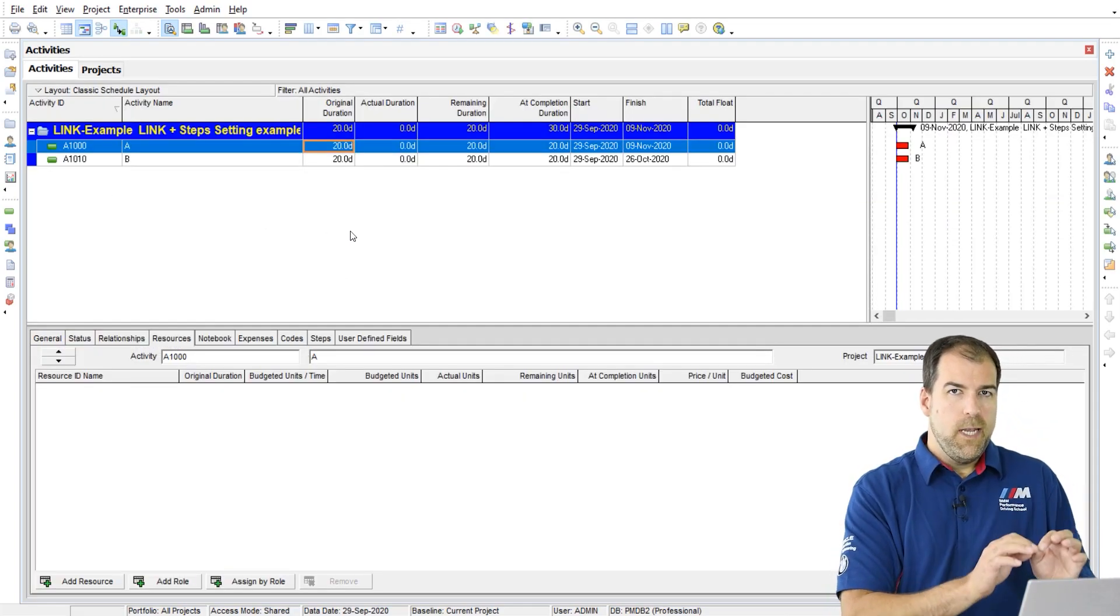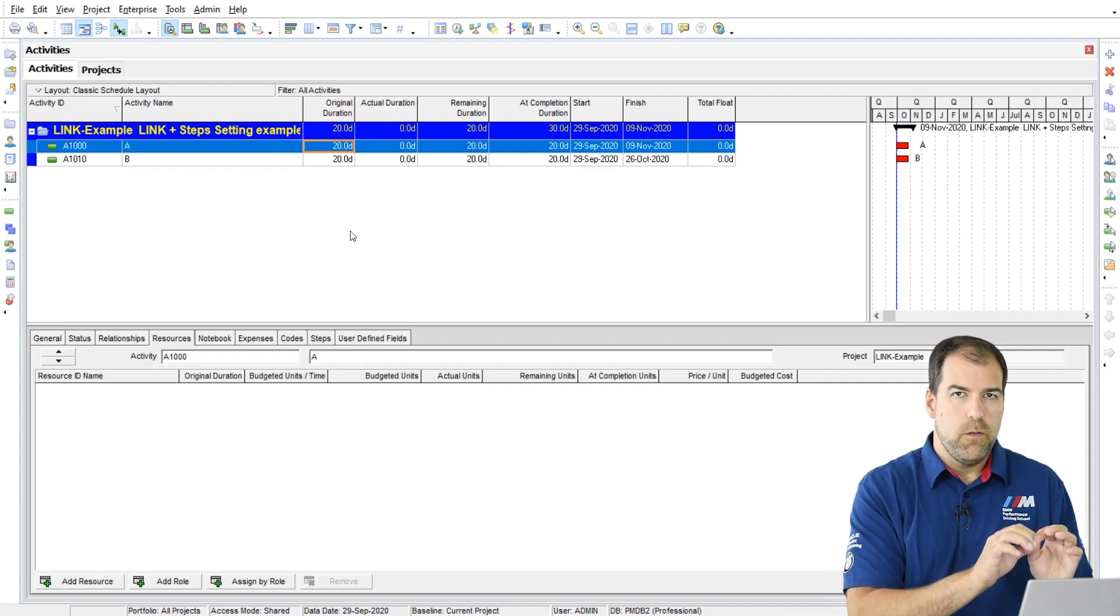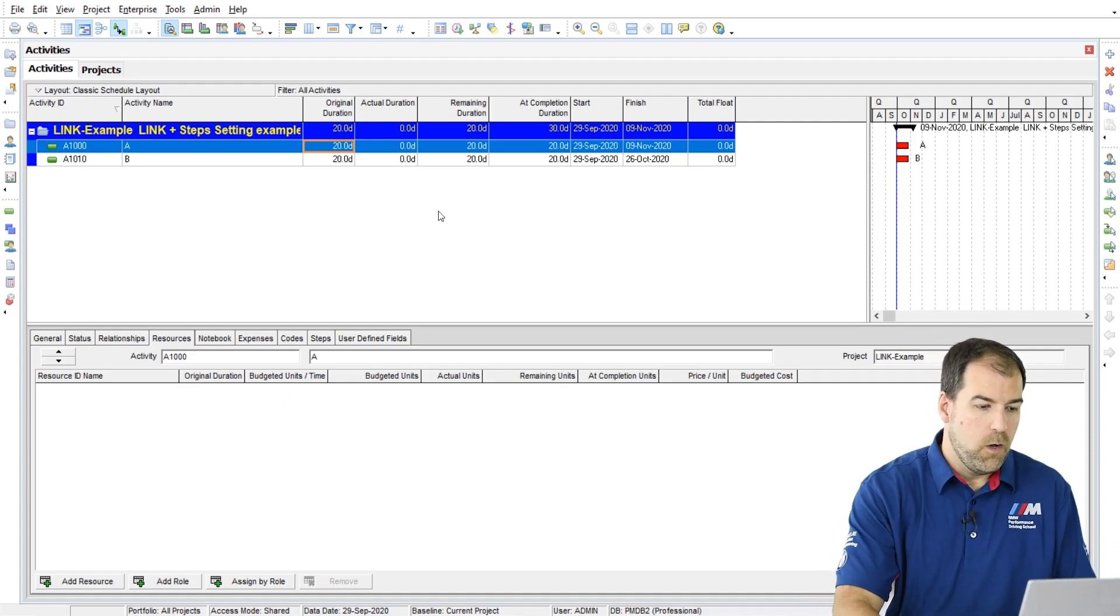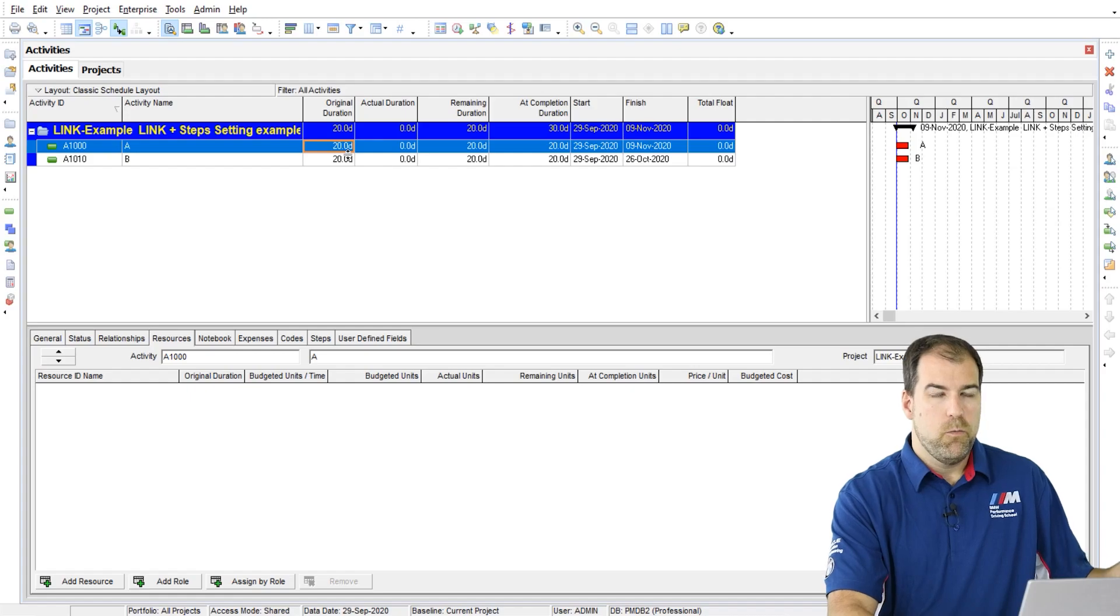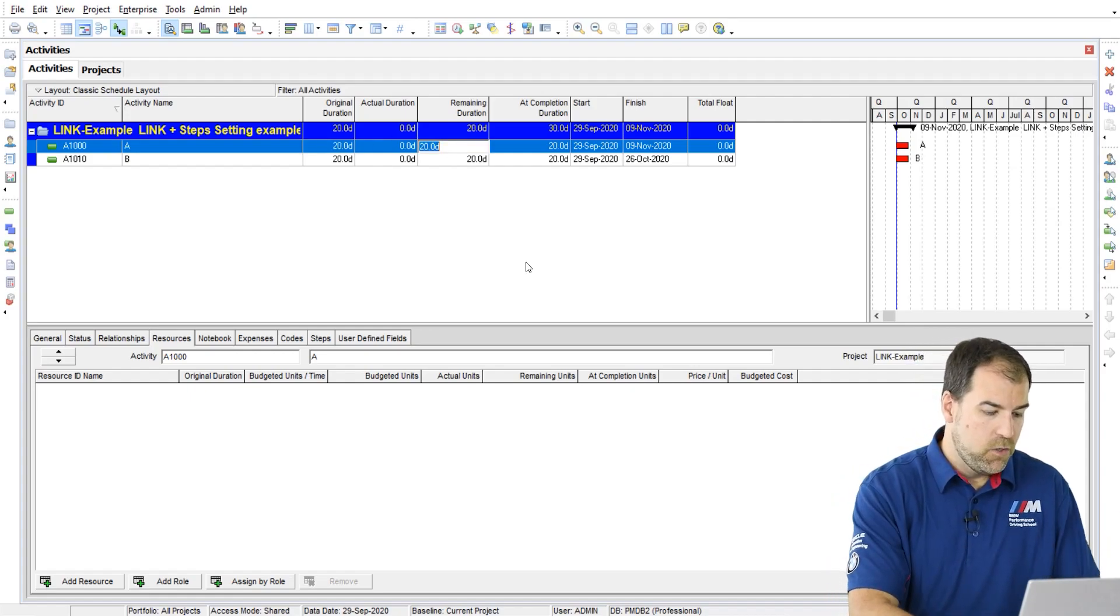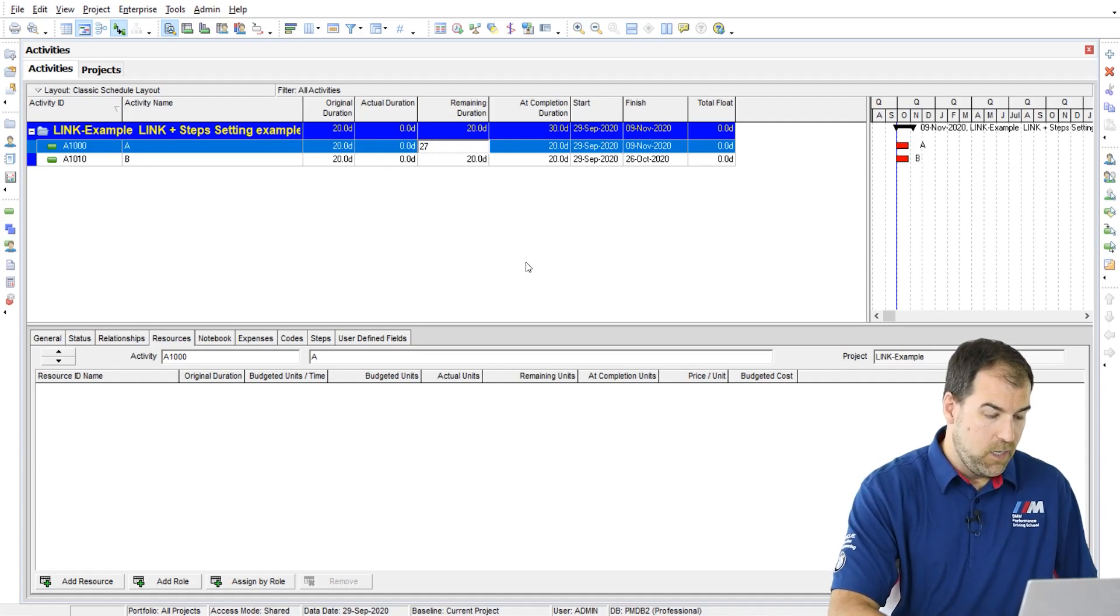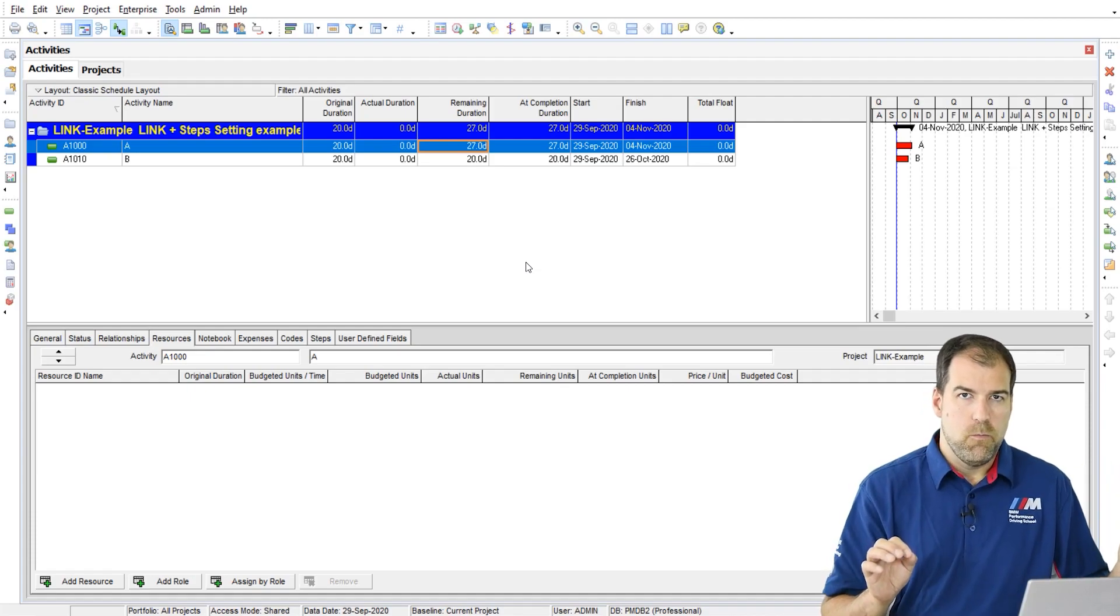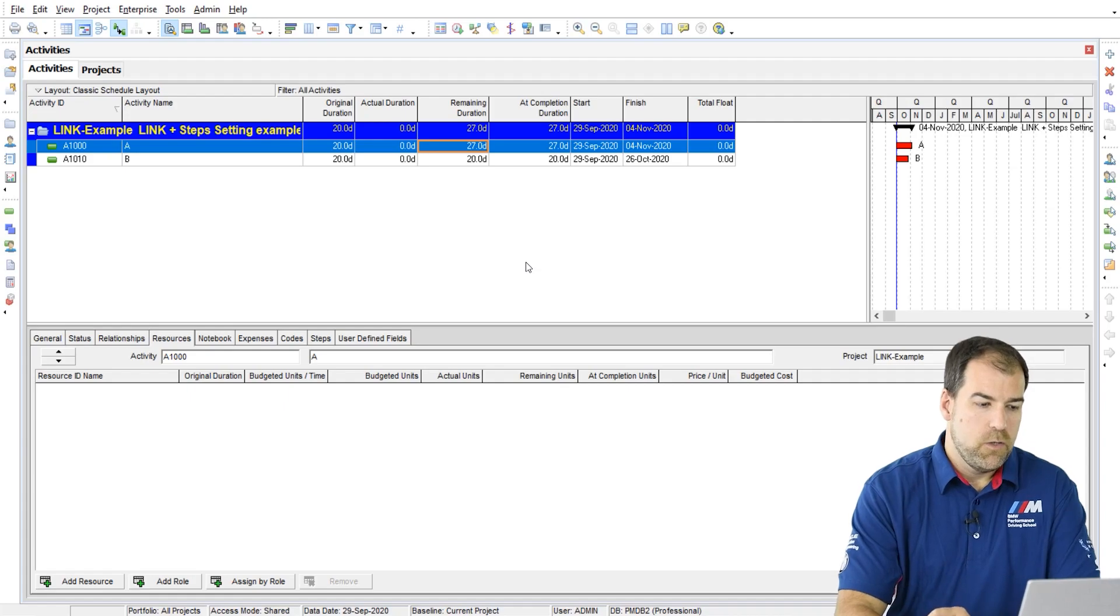What happens is that equation where all three of those durations equal each other is unlinked. So I'll show you what happens. My original plan was 20 days, but now I can come and edit the remaining duration and say, make it 27 days. And those don't equal each other anymore.